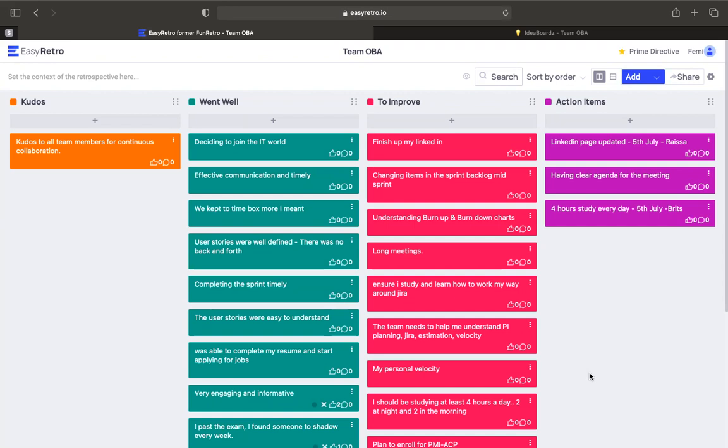When the developers are done with their coding, they need to have the code reviewed. So there's a column on our board that says review section. The cards stay there for a while because the people who are supposed to review them are so busy, it takes time for them to review it. The developers know what is going on, they understand, but that is still a constraint.